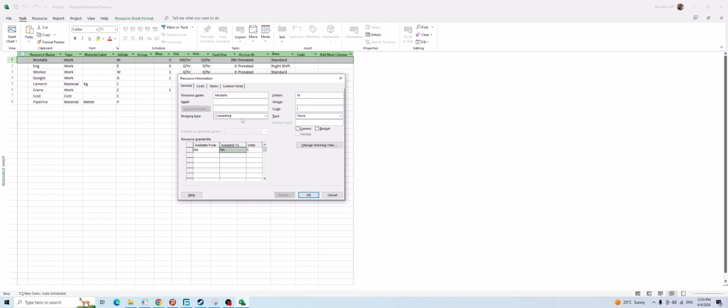Booking type, you have two options: proposed, committed. By default it's committed. If the booking type of a resource is proposed, it means that you define a resource in Microsoft Project, but you are not, for example, allowed to use that resource later for resource assignment. You don't have permission to use that resource. It is not affecting calculation, only during the resource automatic leveling, which we'll cover later.